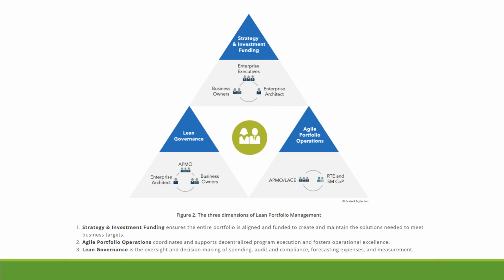So it's very important to have an agile PMO and lean governance to build different layers. Actually, in my organization, as part of agile transformation, I built three layers of governance, measuring at sprint level, measuring at release level, and monitoring at product level.